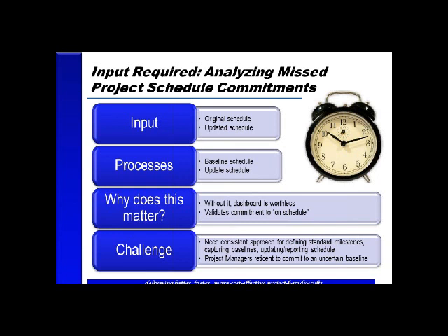And so if we have a baseline, there's no variances. If we have a baseline but we haven't updated those schedules, Project automatically copies the schedule into the actual, and therefore there's no variance. So it can be pretty mysterious to project managers how all this works. So again, we're relying on not only the original schedule having accuracy, but the schedule being updated against the baseline.